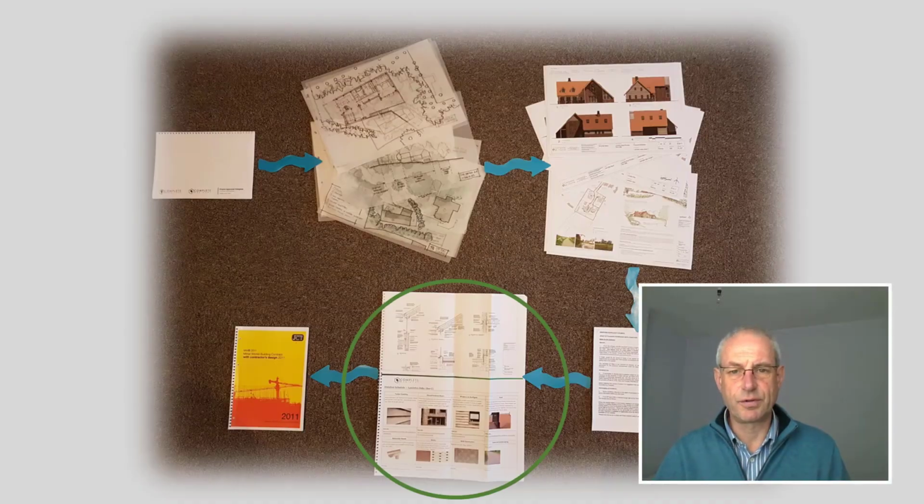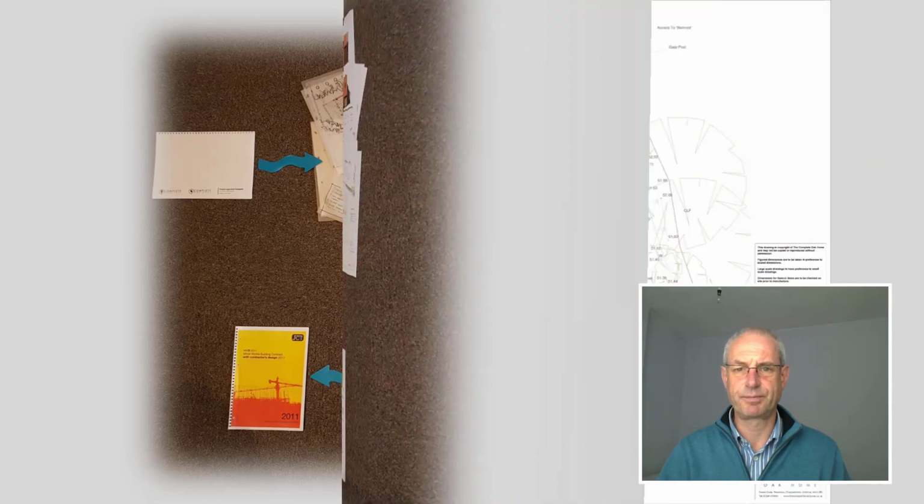So we're going to move on to the next stage, which is the development of the construction drawings and a finishes schedule. Now, these documents are absolutely imperative to provide documents from which the building can be accurately costed, the documents from which it can be accurately built, and also to provide the basis for a really robust contract, because the contract, which we'll come on to, will ultimately refer to these documents.